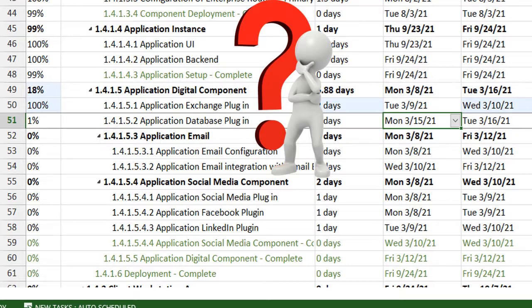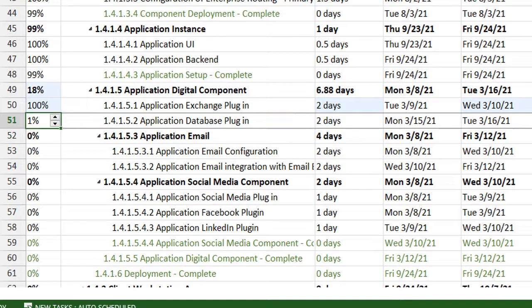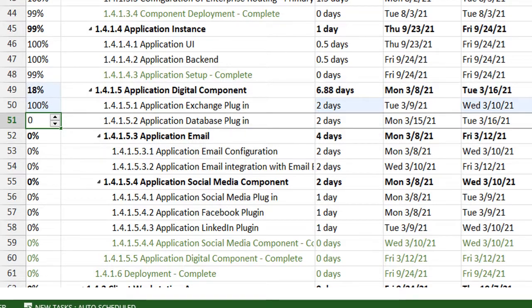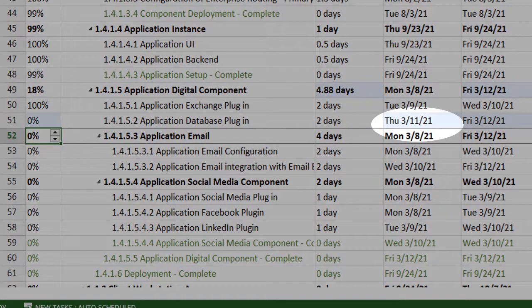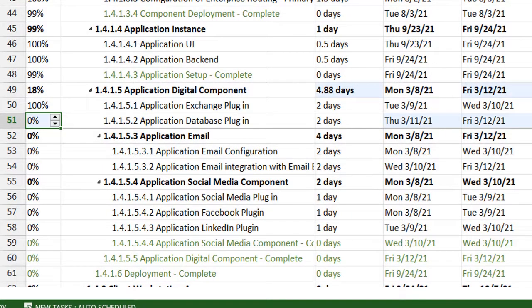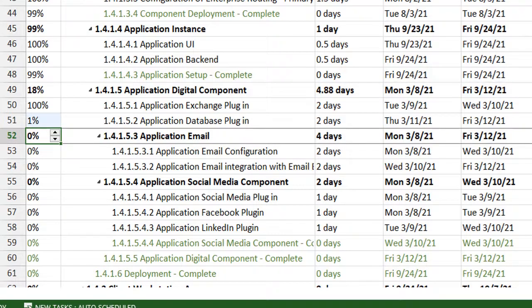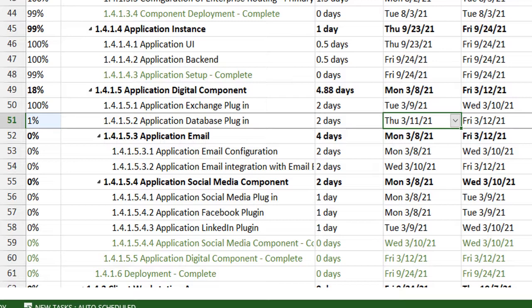Now I'm going to show you how you can change this. Basically what Microsoft Project does is it fixes or freezes the start date with the understanding that this task has already begun. So in order to nullify that, I'll set the percentage to zero for task 51. And as soon as I do this, you see that it will automatically adjust the start date to start right after task 50 finishes. Now I can set it back to 1% and you're back on track in terms of percentage and your dates have been adjusted. So this was just a quick tip.